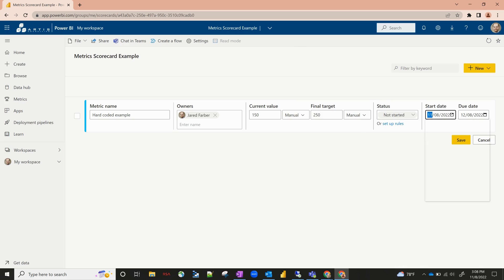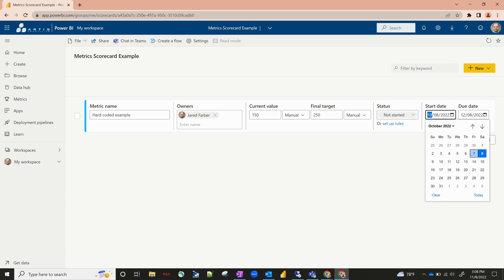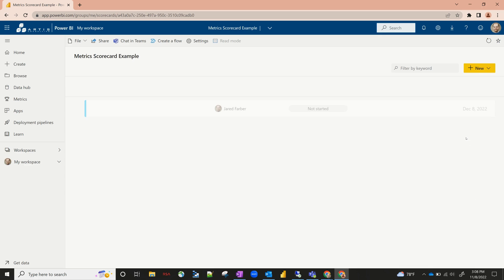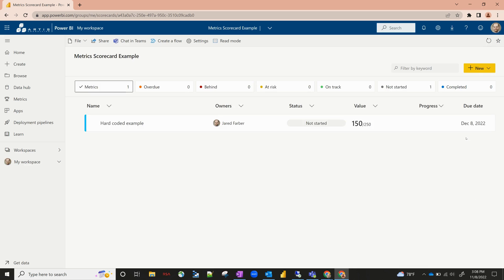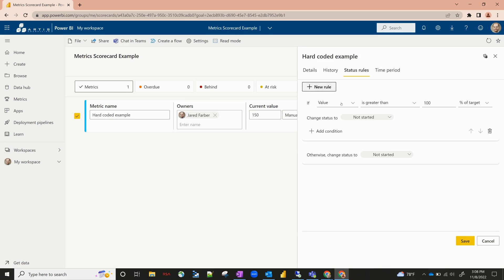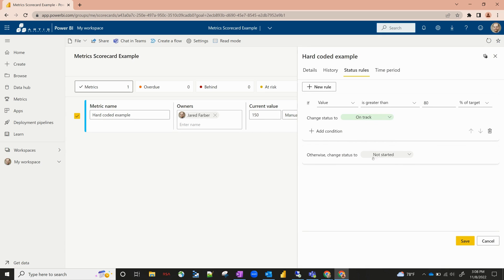Our start date is November 8th — let's move that back to October 8th. And then our due date is one month from now, December 8th. Go ahead and hit save. Now you can see our first metric. Let's go ahead and edit this metric, go back into the status, and set up rules. We'll say if the value is greater than 80% of the target, then we'll change the status to on track. Otherwise, let's say it's behind schedule. Go ahead and hit save.